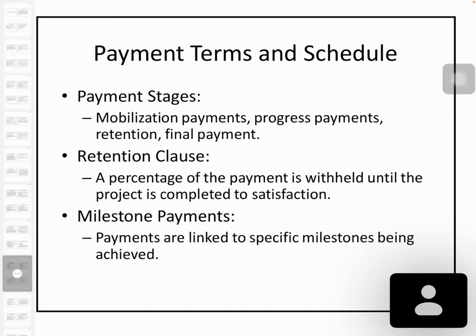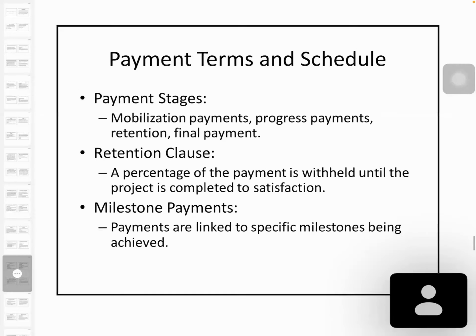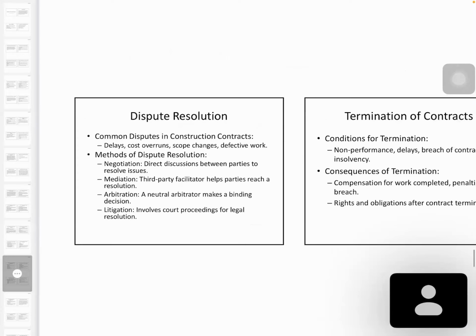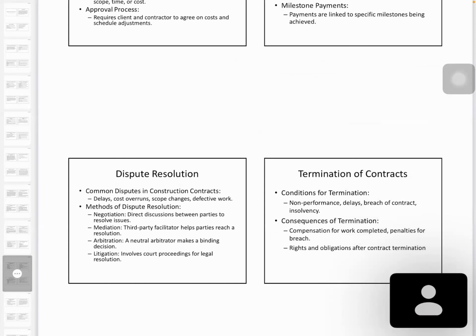Another thing is that milestone payments are also included, because that will encourage the contractors to complete the project on time. So if you complete the structure, this amount; basement complete, this amount; ground floor complete, this one; first floor, second floor, third floor, roof. You can make it a milestone payment for the structure and also for the finishing works. But these are very complicated; in the normal SBD2 or SBD4, you have a minimum amount for the payment.